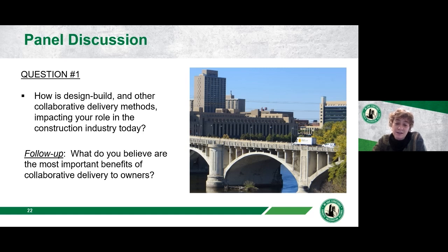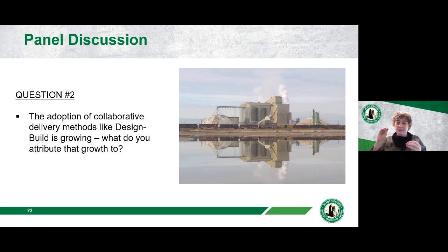And in the case of progressive design build, there would be no incentive of going for the lowest cost design because it's all about the right team, the right approach, and you're then collaboratively coming up with the design moving forward. It's the same concept as design bid build, where lowest price has an inherent conflict built in: prime contractors would be incentivized to look for loopholes in the specification because they got to come in 12 cents cheaper than the other guy.